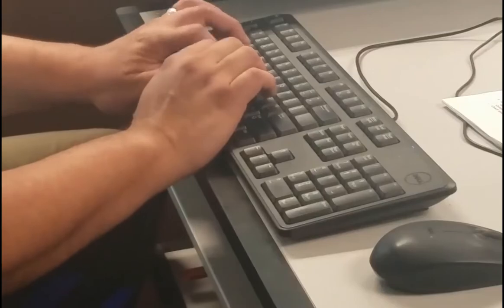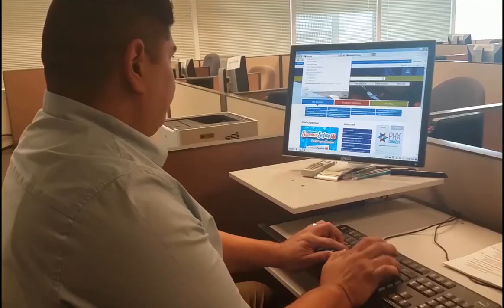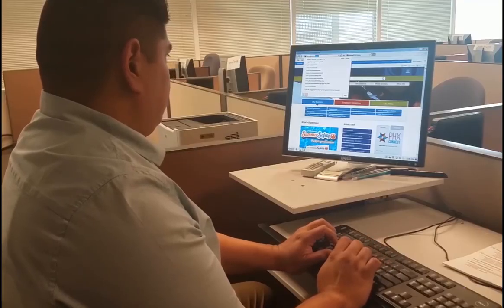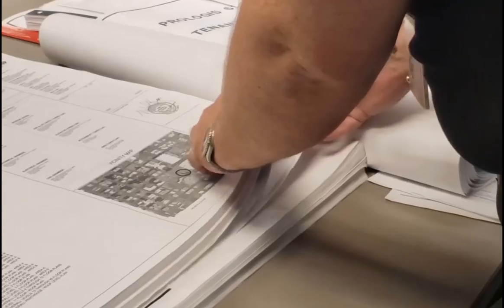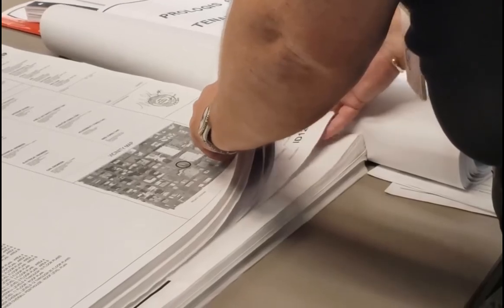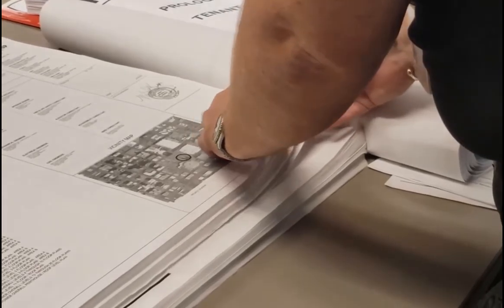Customers often upload everything in one folder, which takes time for the reviewer to separate and organize and therefore adds time to completing your review.